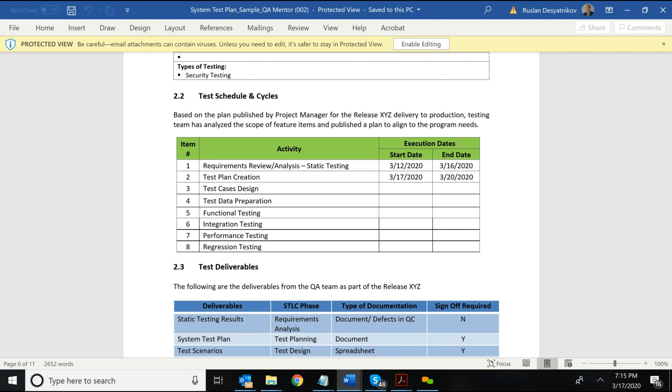But in your case, even if you say it will take me 3 hours for this particular user story to build the test cases and complete the execution, that's also perfectly fine. Nobody will say, I don't know what hours means. But in some cases, if you know the value of each point, like 1 point for 1 hour, or 1 point for 2 hours, again, from company to company, I saw different breakdowns.